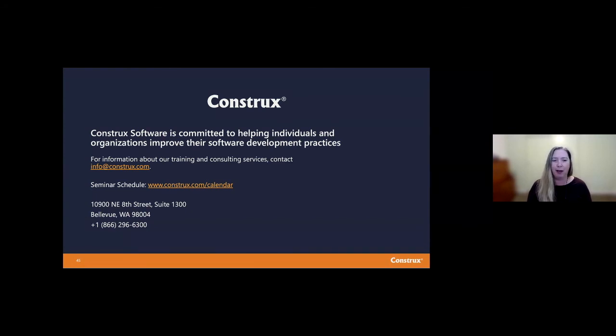So I'll just pick on, for example, perhaps we have a bottleneck in system testing, that end-to-end testing of the work of 50 teams, making sure that all hangs together well. And we actually know that if we dump 20 features in there, it takes us 18 weeks to get something out. But if we feed them 10 features in a batch, we can get things out the door to our customers in 8 weeks. I want to optimize for the flow of value across the whole system. And that's what WIP limiting, both in process and done for every column, gives you.